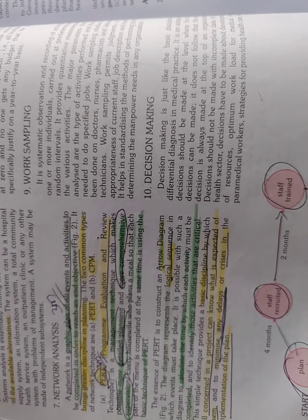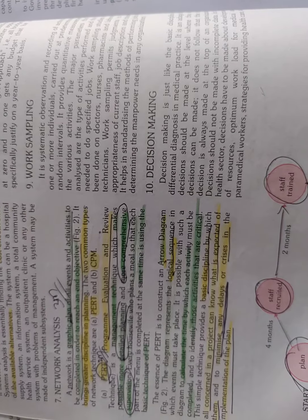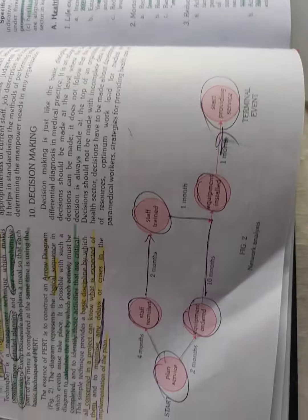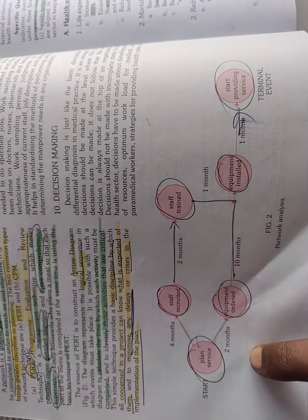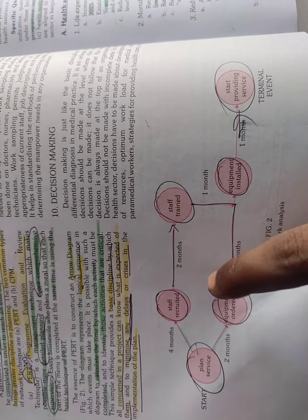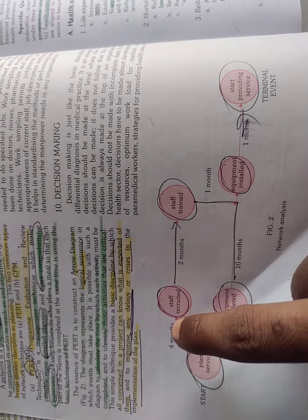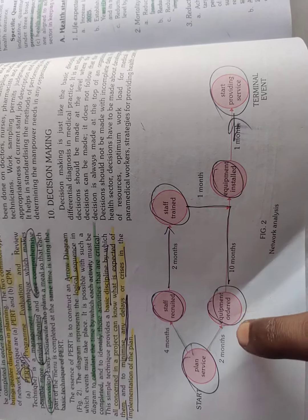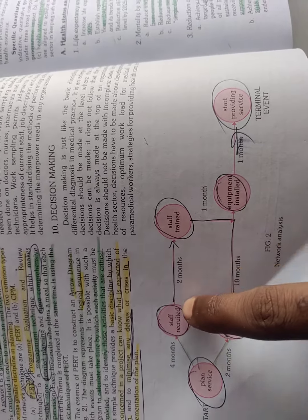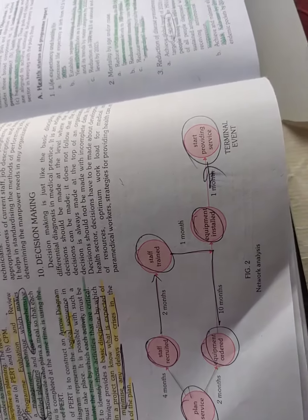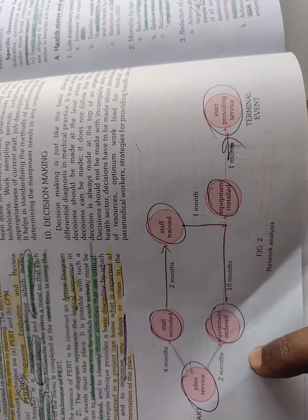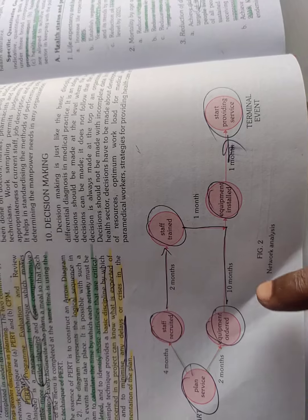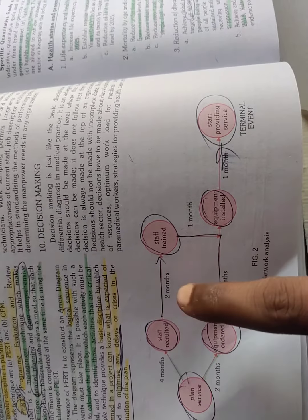In case of PERT, Program Evaluation Review Technique, the important thing is planning and organizing. For example, to arrange the staff takes four months, for equipments it takes two months, for staff training it takes two months, and for installation it takes ten months. This time with arrow marking - that's PERT, Program Evaluation Review Technique with arrow marks and timing.